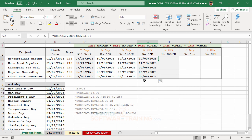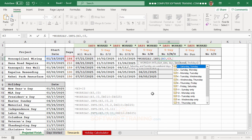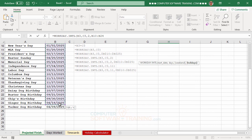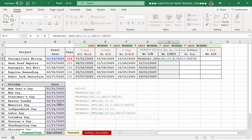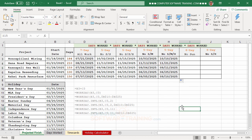The next column uses WORKDAY.INTL and also includes holidays. Different countries have different holidays, so you'd substitute your own holiday list here. The formula is: equal, WORKDAY.INTL, start date, comma, number of days, comma, number 2 for the Sunday-Monday weekend, comma, then select the holiday range. After selecting, press F4 to make the range absolute, press Enter, and copy the formula down.